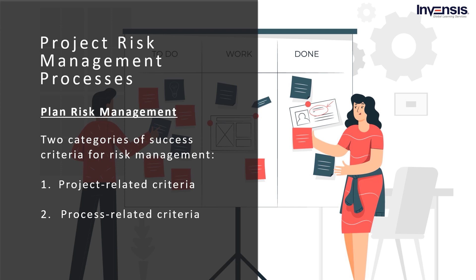Next, we have process-related criteria. We have already discussed several factors that measure success in project risk management. For example, the project risk management process for a research project needs to address more unforeseen changes than a project with a more predictable environment. Therefore, a research project risk management process may be considered a success even if it results in more variance from the baseline than would be allowable for a more predictable project.